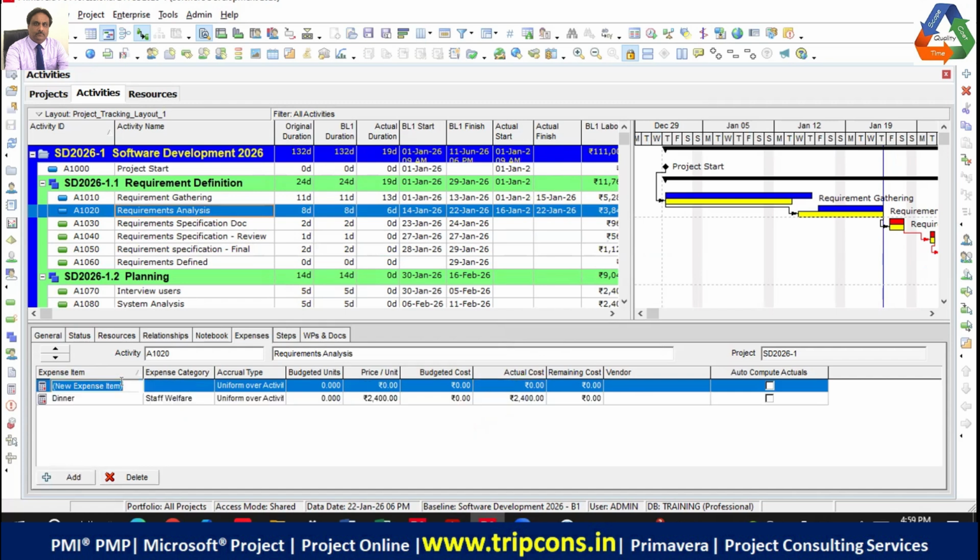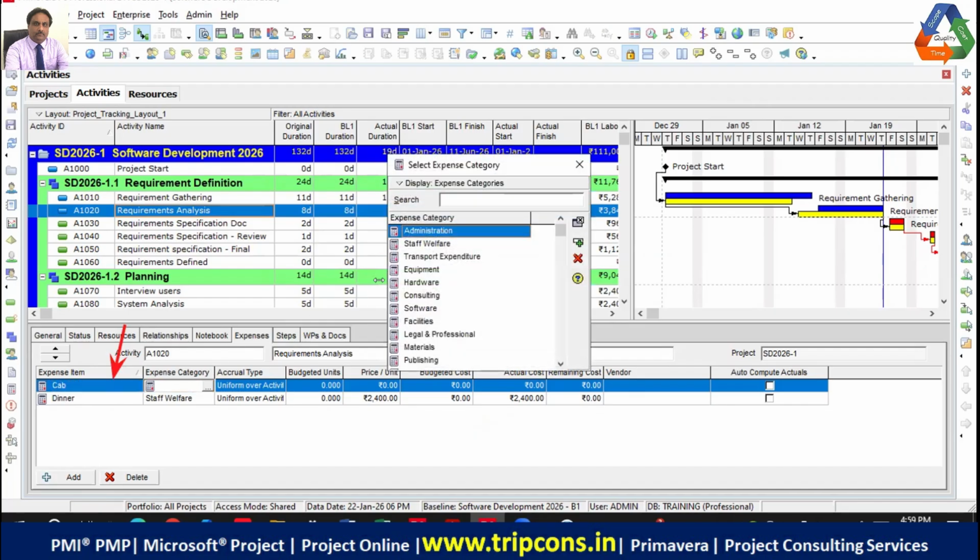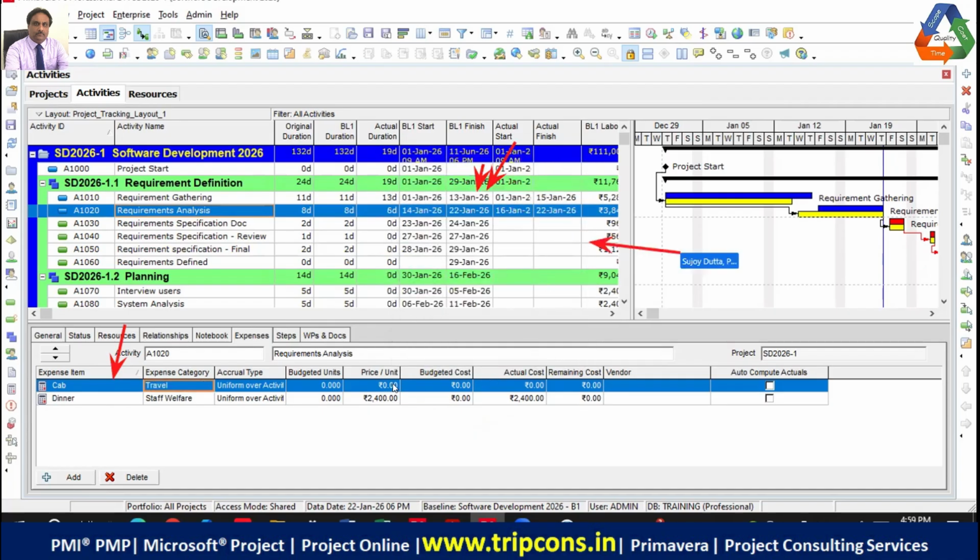And then you write here cab. Okay, so it is cab. Yeah, yeah, that's it. You press enter. In the expense category, you select travel, not transport. Transport is for goods, travel is for people. People travel, goods transport. So in the search box, you type here TRAV. Okay, you have already scrolled. Yeah, fine. You select it and the actual for the cab is 2100, right? And you press enter. So once you do, all this data is now captured into the system